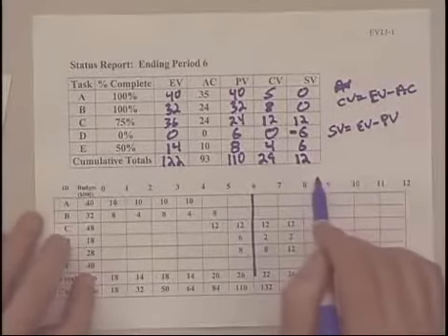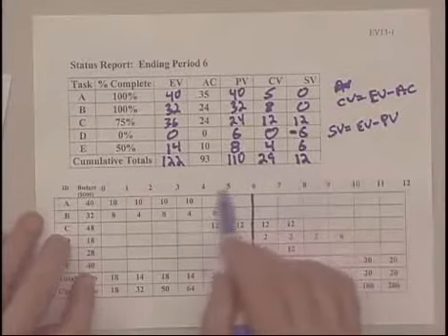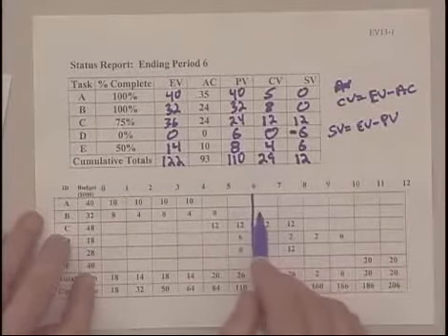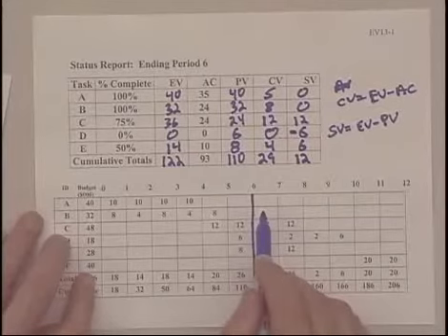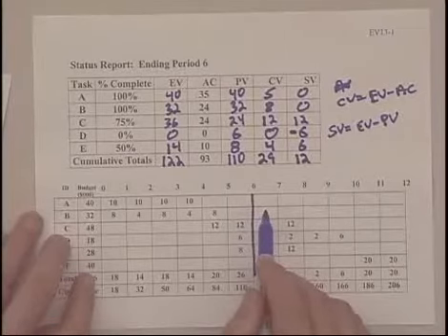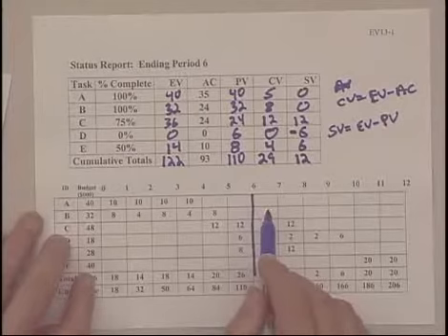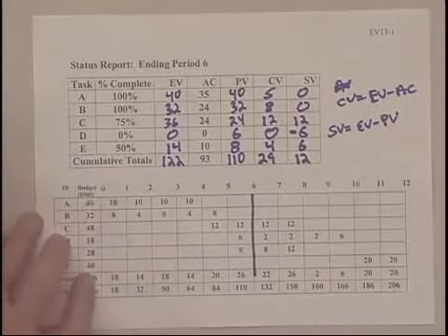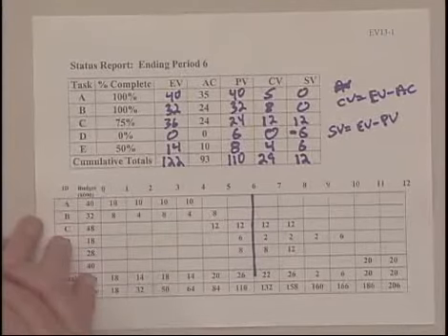And one of the limitations of schedule variance is that schedule variance doesn't differentiate between critical and non-critical activities. If you go back and look at that original network, and you should do that now, you'll see that activity D is on the critical path. And the non-critical activity, E, is already ahead of schedule.